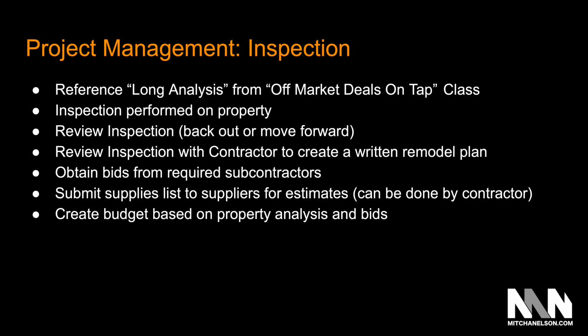So have an account set up at one of the big box home repair stores, and make it so that they can call you and say, hey, we need to stop in and buy this and this, and you can call in and just approve the transaction at the point of purchase, and that just goes right onto your credit card or right onto your debit card, whatever the case might be. But you should be providing the materials, because A, you can push materials that were left over from a previous project, and B, it allows you to pay your contractors in a way that manages them well.